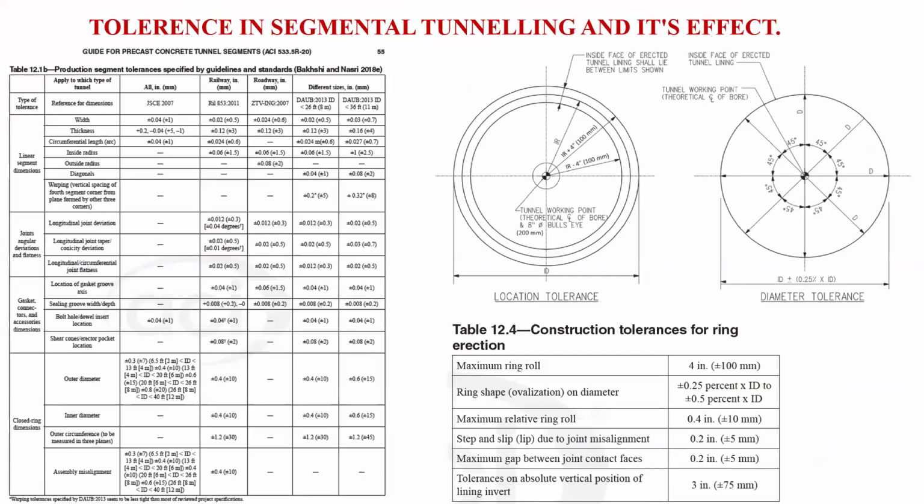here you can see there is a tolerance for the precast segments. There is a construction tolerance, and there is a tolerance even after building. So we check whether the rings that we have installed are lying within the tolerance limits. That is part of the regal survey. If it is a 3 kilometer tunnel, either you have installed 200 rings or 250 rings. So you check that all the 200 rings are lying in a line, or in 3D, whether all the rings are within the tolerance.